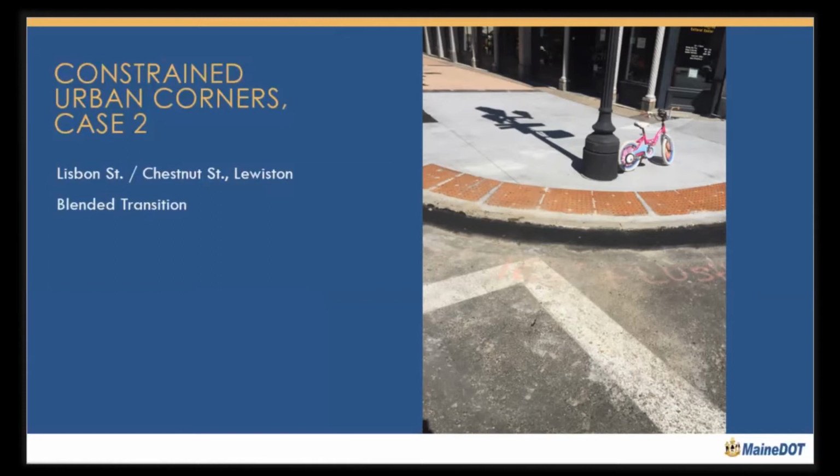So how do we get a solution? Limiting the scope of work, meaning don't chase the sidewalk a long way so that we have a sidewalk improvement project, but just an ADA upgrade at the corners where we're doing signal upgrades. This was the compromise to make something work with the constraint created at the corner.